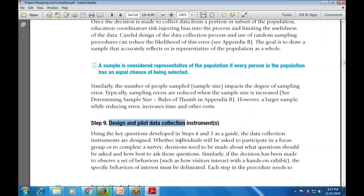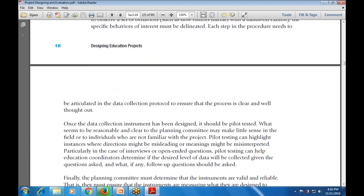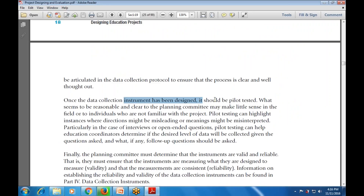Step number nine is to design and pilot the data collection instrument. First we design, then we do pilot testing - a first-time run of the questions we are going to ask. There are various specific behaviors of interest that must be examined. When the data collection instrument has been designed, it must be pilot tested, because what seems clear to the planning committee may make little sense to individuals not familiar with the project.